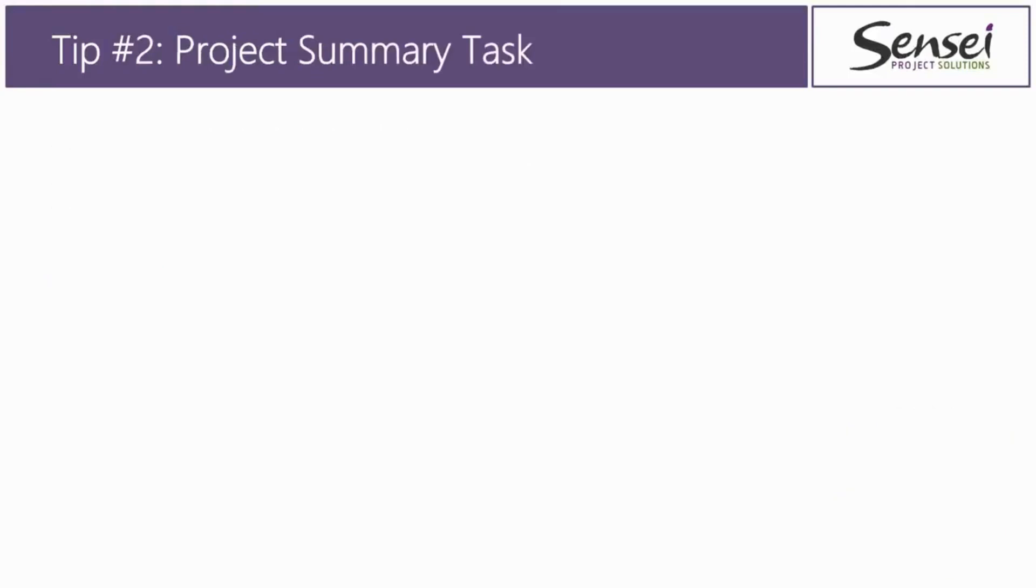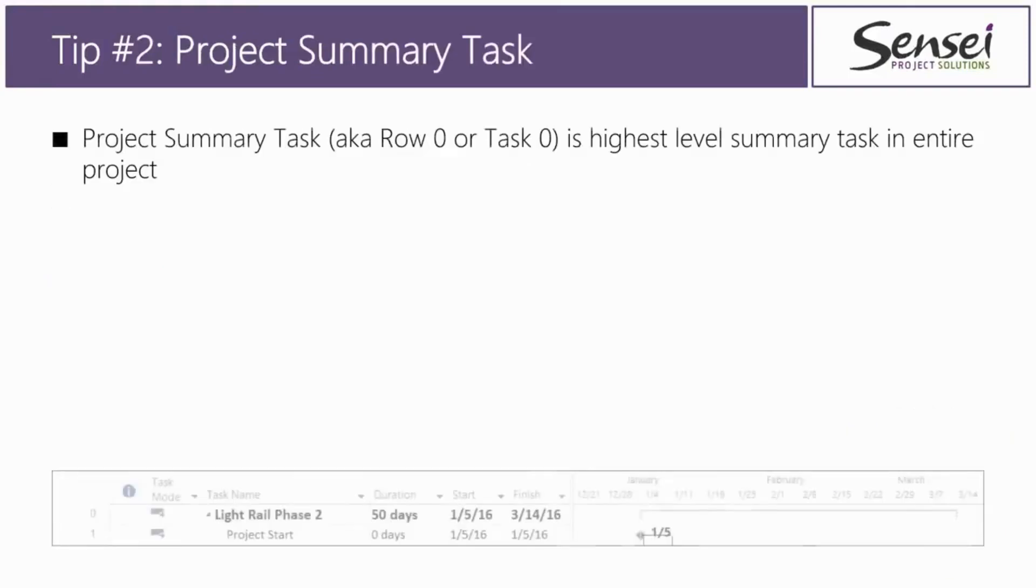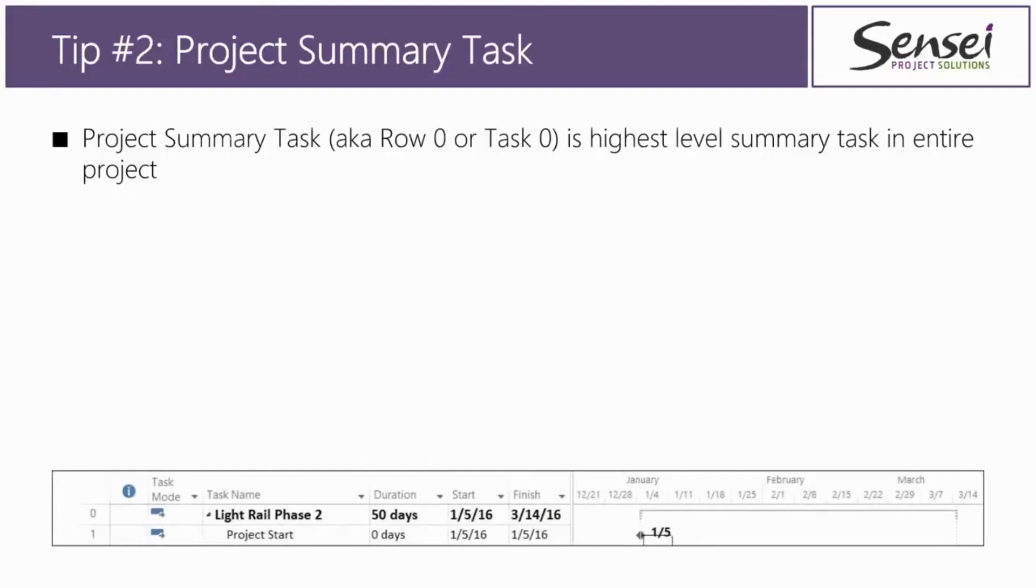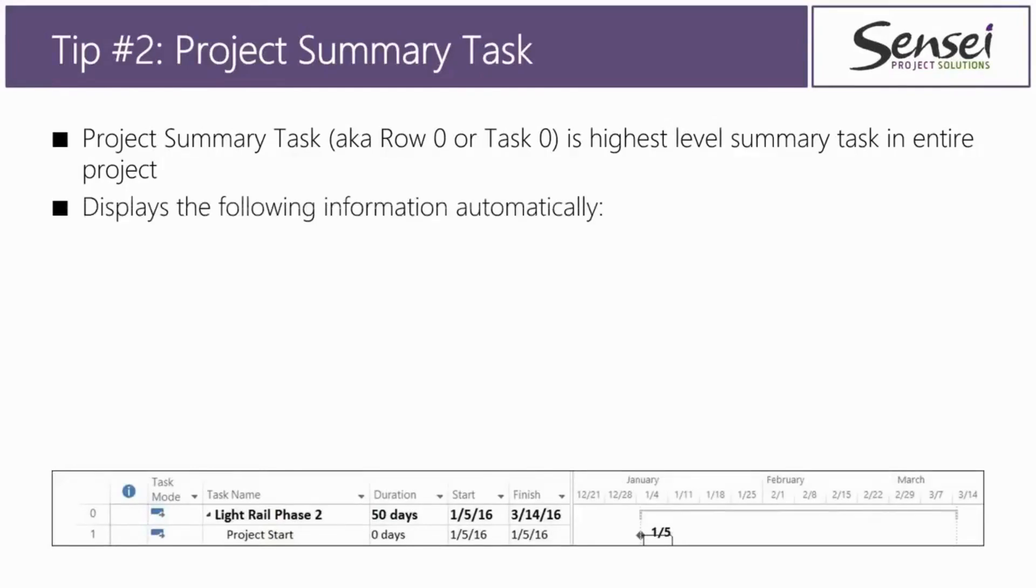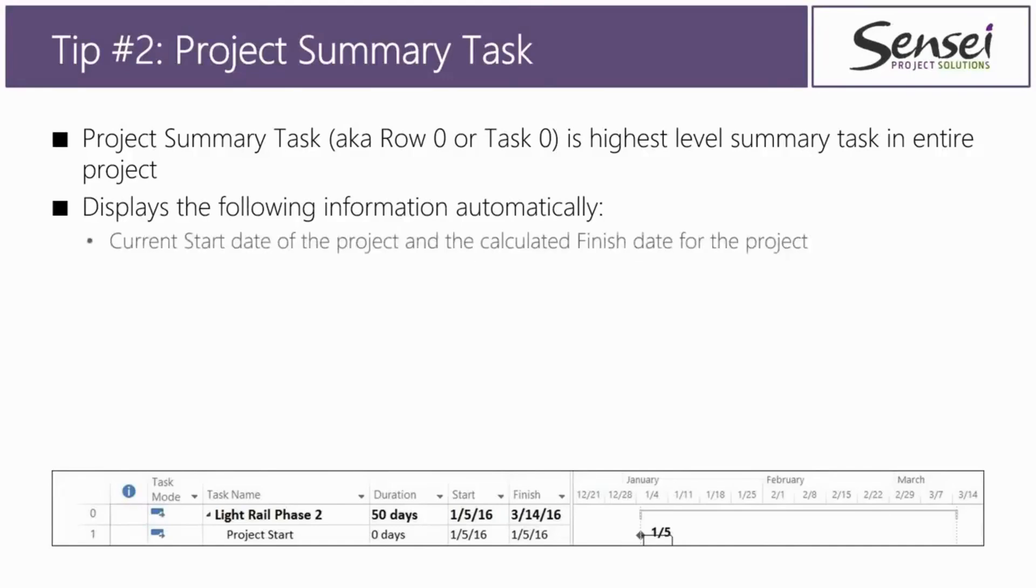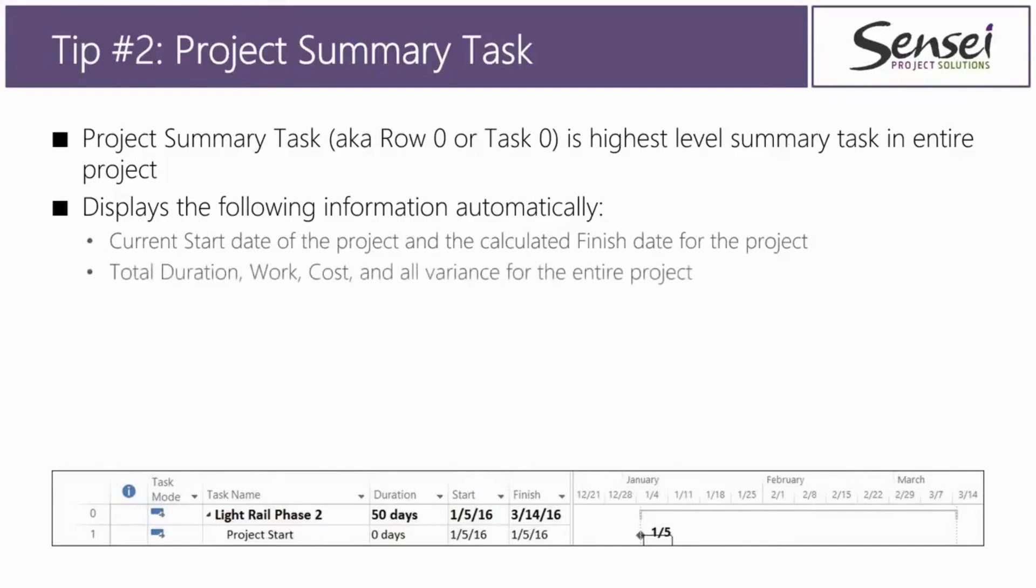All right. Now let's get on with it. Tip number two, I recommend that you display the project summary task, also known as row zero or task zero, in every one of your projects. Now what is this project summary task? It's actually the highest level summary task in the entire project. What it displays for you automatically is worth two clicks to get it to show. And here's what you get to see. You get to see the current start date of the project and the current calculated finish date of your project. That's nice to know.